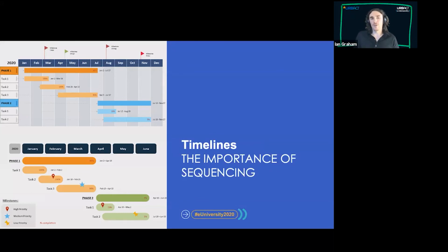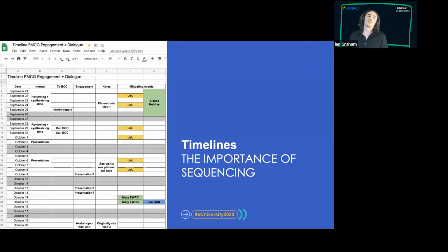You can represent it in this sort of way. If the context is right or it's simple enough, you can represent it in a different sort of way on a spreadsheet or a Word table with dates down the side or across the top and so on. So there's different ways of doing it. And this sort of approach is easier sometimes if you've only got a small number of things. If you want to show something more complex, sometimes the visual thing is easier to do. Go with what works for your situation. I often use both combined together. So you have some of the detail in the table and you have the timeline as a communication visual, and you can use those together to get both benefits.